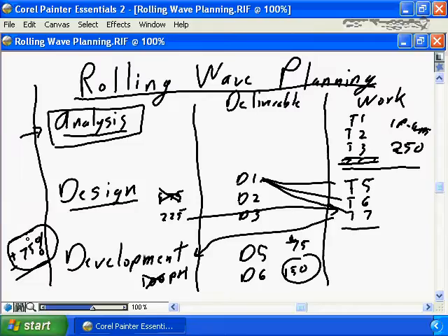So when you use a rolling wave planning process, it's important that you define your level of confidence, so that when you're presenting the total project picture back to senior management, back to your business sponsor, they understand that this is not a firm, fixed estimate for the total project. It's simply a firm, fixed estimate for the next phase of your rolling wave, and best assumptions, and I'm going to use the term best guesses, for the further out phases of your project.